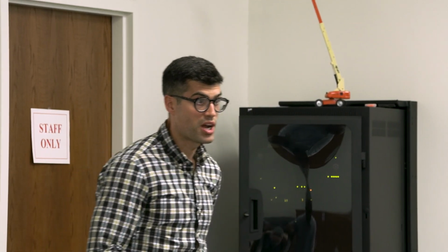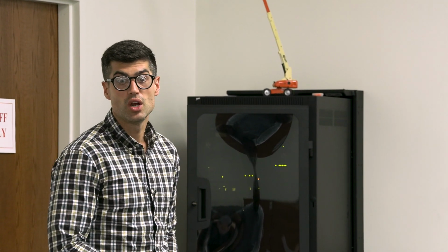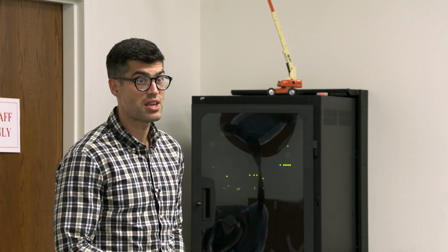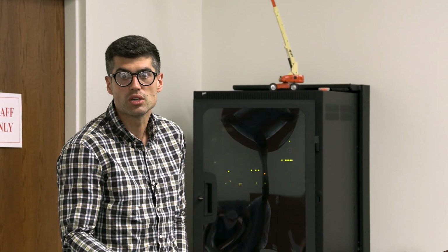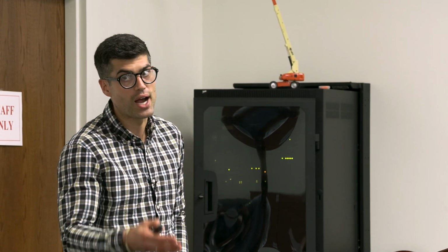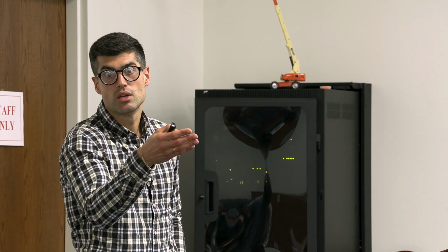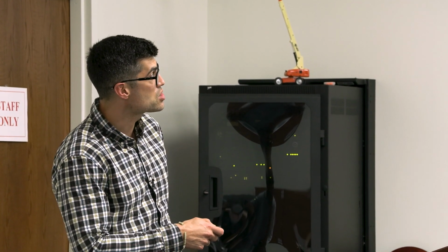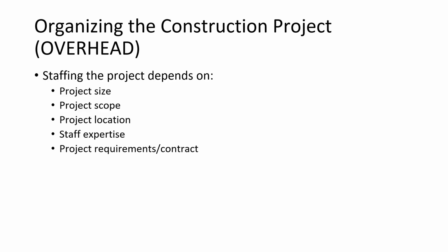Hey, it's a big warehouse. We don't need as many people. Big Amazon type tilt-in-place, cast-in-place, whatever it may be, I might need fewer people because it's less complex. Then I've worked on projects like the Cleveland Foundation, which is dowel laminated timber, very complex, has a bunch of nuances, small building, high level of complexity. So you've got to have that understanding because that's going to help us determine our allocation of this overhead.